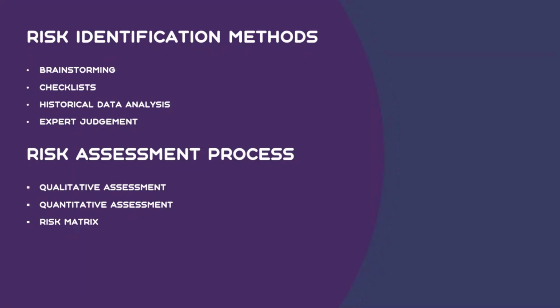Similarly, you can do the same thing for the risk also. Say there is a budget overrun issue. You prepare a cost report and you identify that there is a budget overrun issue. The cost was really high, but the progress was really bad. And when progress is very bad and cost is very high, eventually you are above the budget or you spend more than the budget in that month. So in qualitative analysis, what you do basically, you identify the risk and you put it as a high risk.